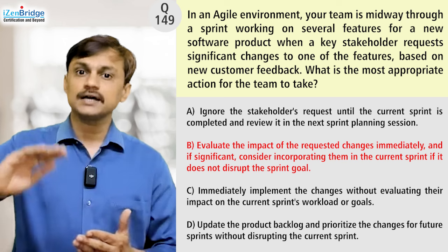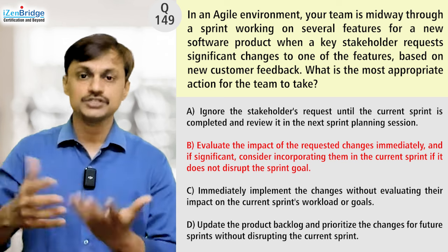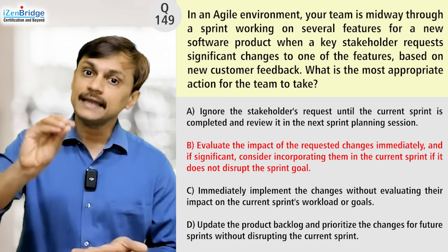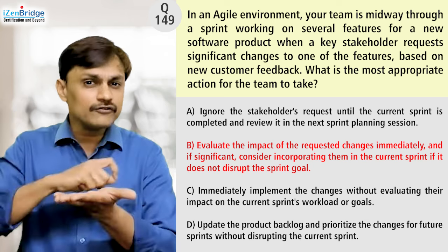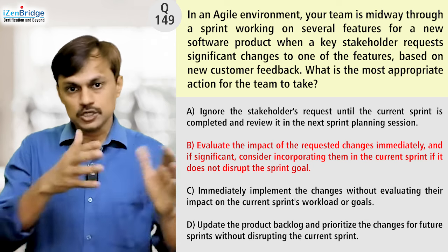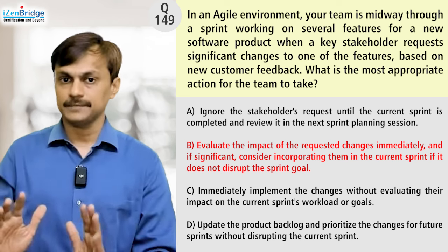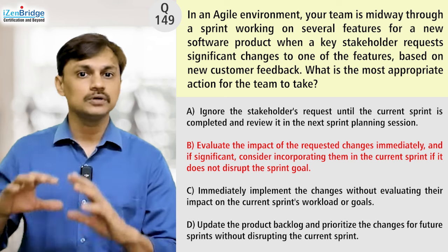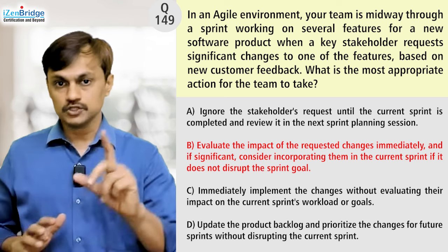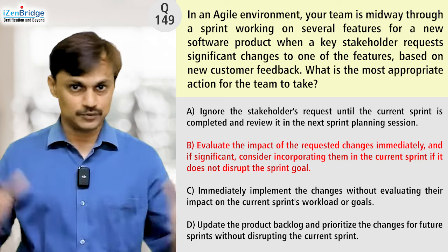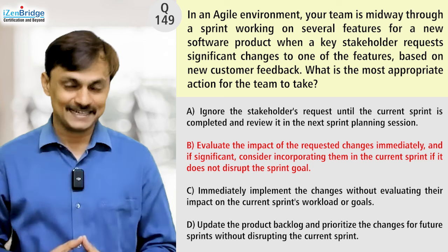The user stories or features are expected to be negotiable items. They are not like frozen baseline items. So if we go along and some new discovery happens, we can incorporate it. But at the same time, we don't want to miss the current sprint goal. So option B looks great unless we get a much better option than this.